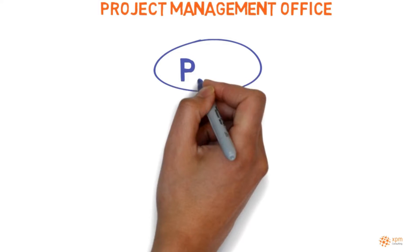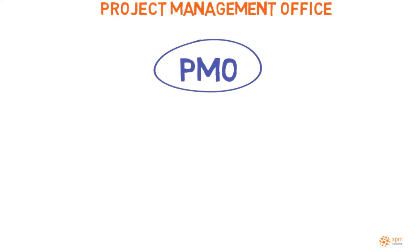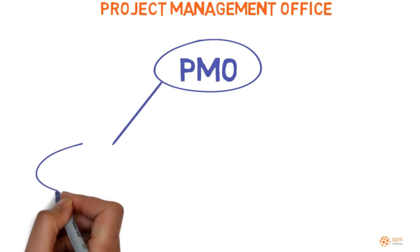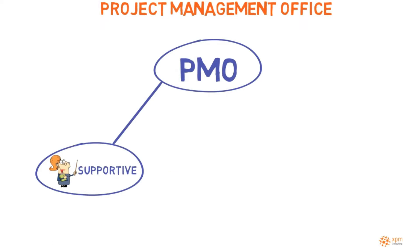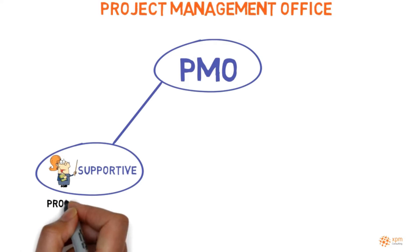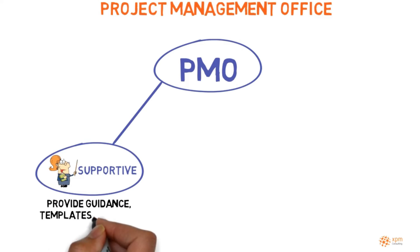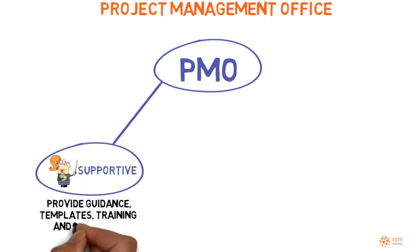There are different PMOs according to their level of project control and organizational influence. A supportive PMO with a consultative and support role. Its responsibilities may include providing guidance, helping solve and escalate problems, providing templates, organizing project management training, and maintaining projects' historical information.